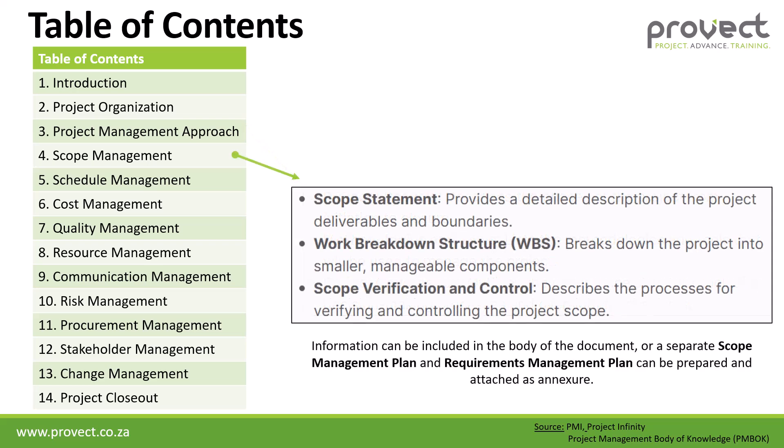The fourth section is scope management. This includes a scope statement providing a detailed description of the project deliverables and boundaries, our work breakdown structure which breaks down the project into smaller manageable components, and scope verification and control describing the processes for verifying and controlling the project scope. This information can be included in the body of the plan or a separate scope management plan, and a requirements management plan can be prepared and attached as an annexure.